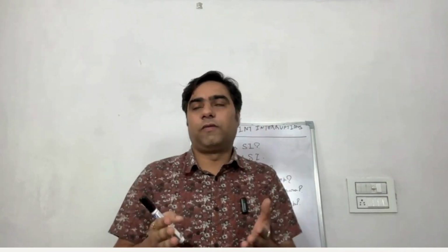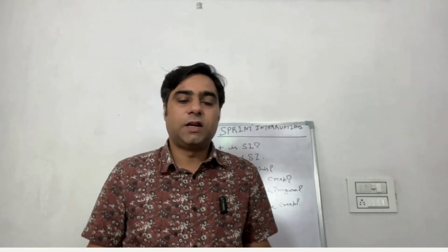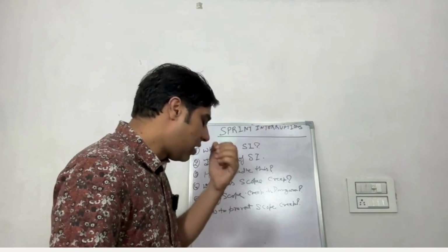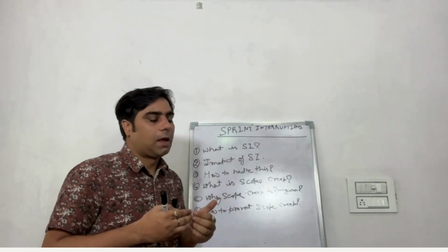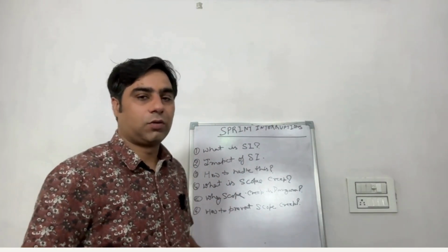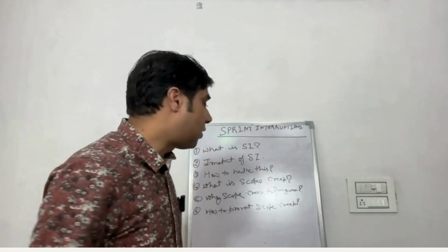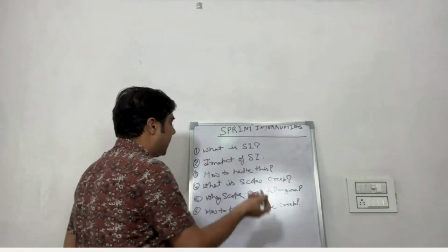Or if you feel that okay, this is something urgent, and you say that this will definitely hamper your sprint, then with the permission of the product owner, you can definitely cancel the sprint as well. It's very rare, but what happens is the product owner only takes the decision that okay, we can definitely cancel that sprint. Okay, now this is all about how to handle this.